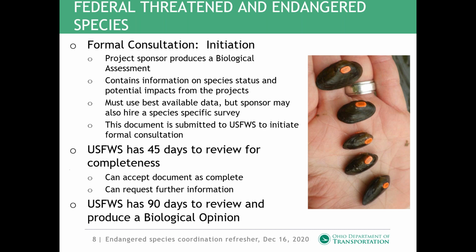Sometimes it's best to do a survey before we get into this, because a lot of times the species is not there. But keep in mind, if you are going to do a survey, this is going to add to your schedule and your timing. It's a long document and it takes a long time to compose.